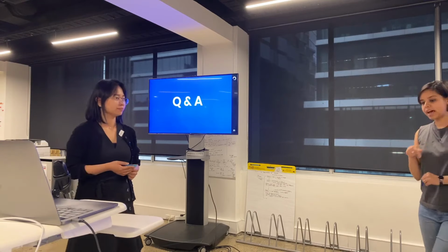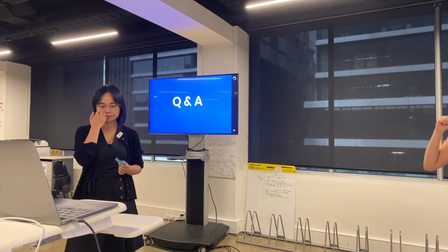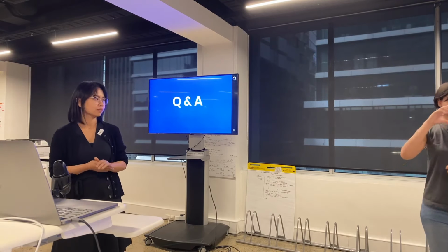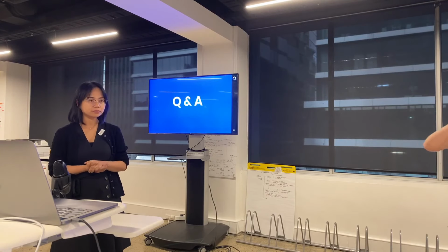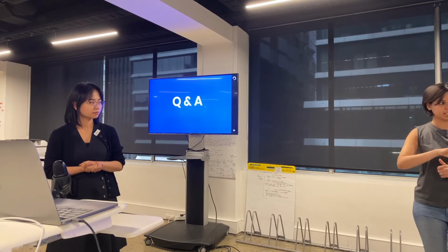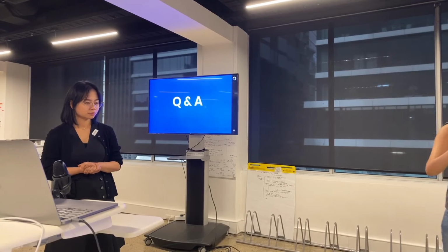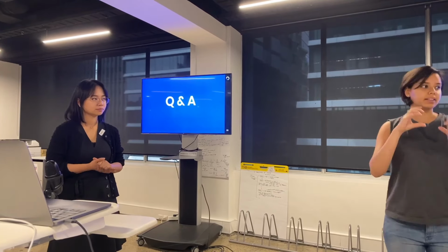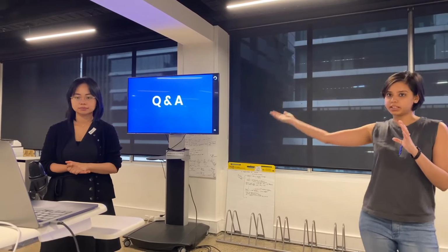So this is something that I've done in the past. When I have a user story map up there, I usually color code the stories that my team has to work on, and a different color code for stories which this particular story is dependent on, but some other team has to work on it.